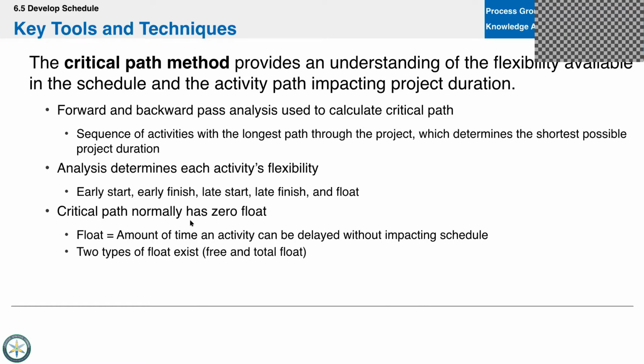Yeah, I would say that in the majority of the projects that I work on, they're probably a little bit different than what Chris would say from a design perspective, but most of my work is planning. So we build in a lot of float and have that luxury. For instance, we'll pad the schedule quite a bit based on what we think it'll take, just because there are so many uncertainties associated with scheduling workshops and getting everybody's schedule in sync so that we can hold a key milestone delivery workshop or meeting.